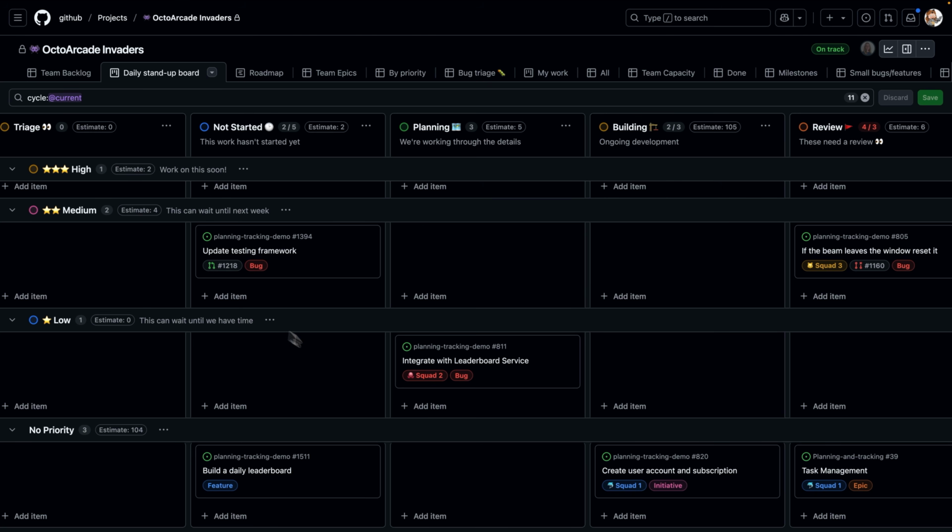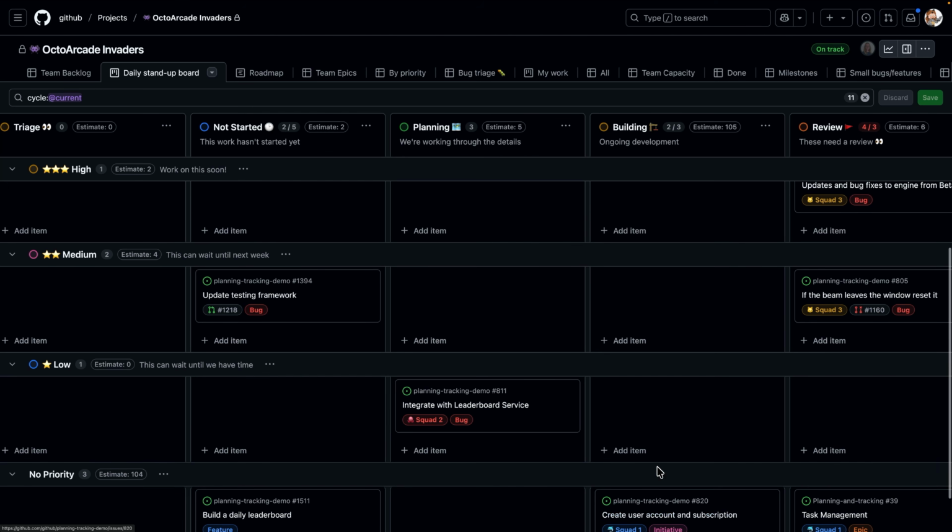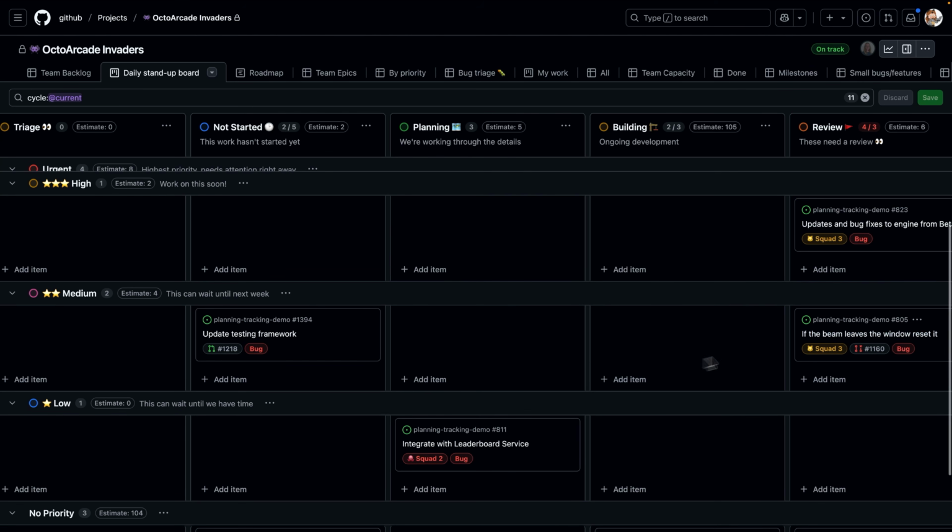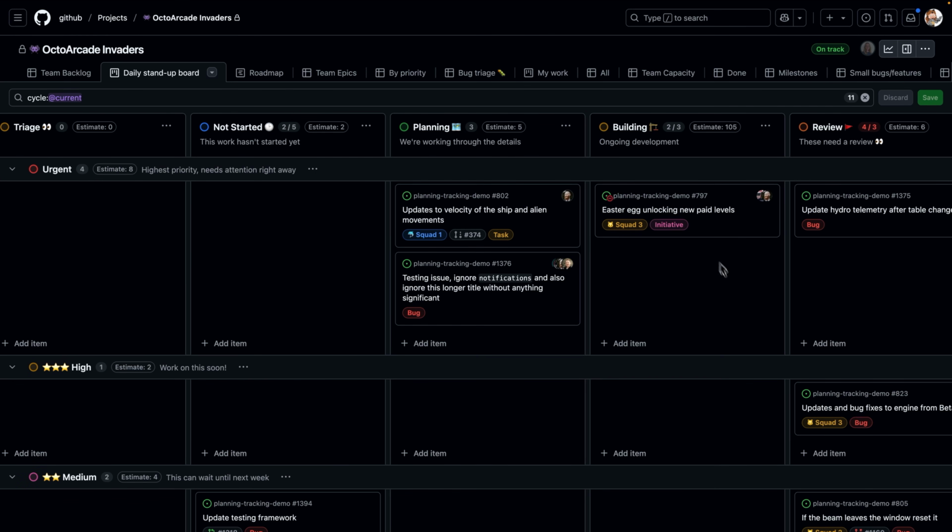I might scroll down here too and say, well, we have things that have no priority at all. Why haven't we picked a priority for those? Or we have things that are only medium priority, but they're already in review. Was there a reason we decided to go ahead with those before we did the higher, more urgent items? So all the usual ceremonies, but I'm going to be able to quickly visualize and see what I need to talk to with my team right here.